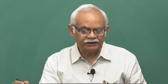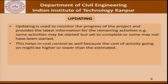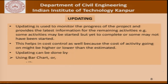Updating is used to monitor the progress of the project and provides the latest information for remaining activities. For example, some activities may be started but yet to complete, or some may not even have started. We have to keep updating our bar charts and CPM charts. It also helps in cost control, as the cost of an activity going on might be higher or lower than estimated. This updating can be done through bar charts or on the CPM network. In today's discussion, we will largely focus on using bar charts for the purpose of updating.